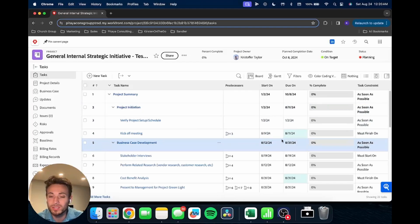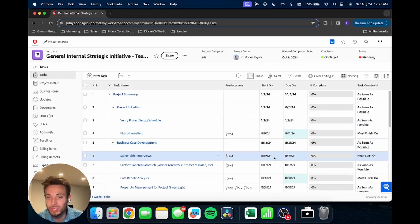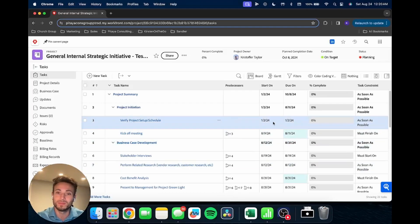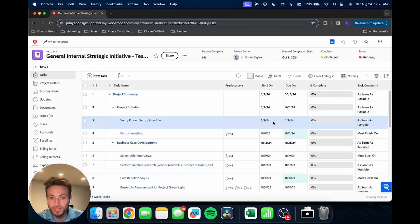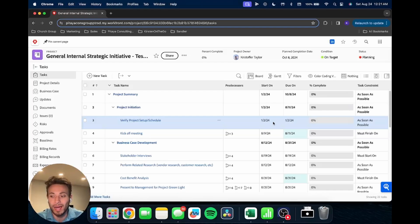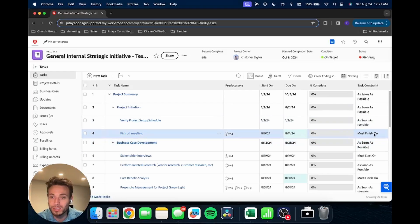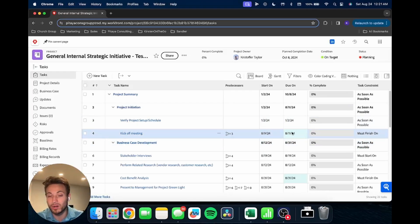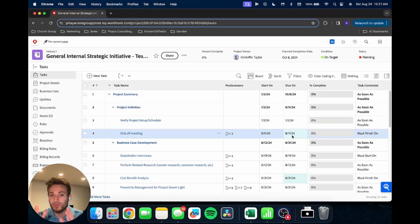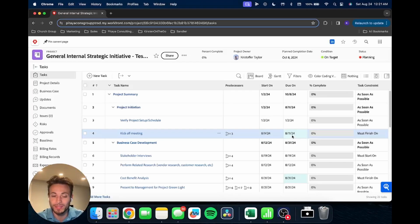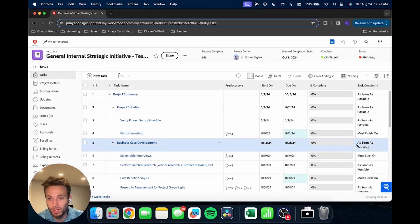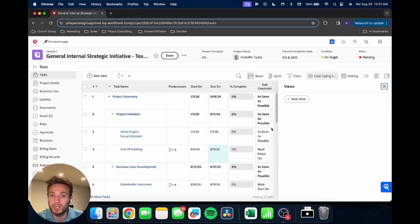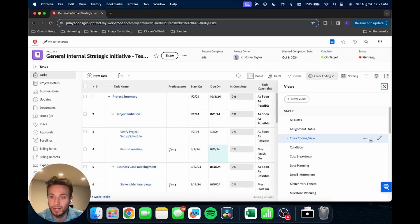One of the reasons for potentially wanting to color code based off task constraint is if you have a date where you're using Workfront to calculate the date based off the rules you have set up, based off the duration, based off the predecessors. But later, or at some point, a hard date needs to be put in that's going to be the more accurate date. That's when, as you put in that hard date, it's going to change that must finish on task constraint. And it could be useful in that scenario to be able to distinguish easily by the color which of these dates have been put in manually versus which haven't. So that's one use case that we've seen for this, using the task constraint as the rule for determining the color.